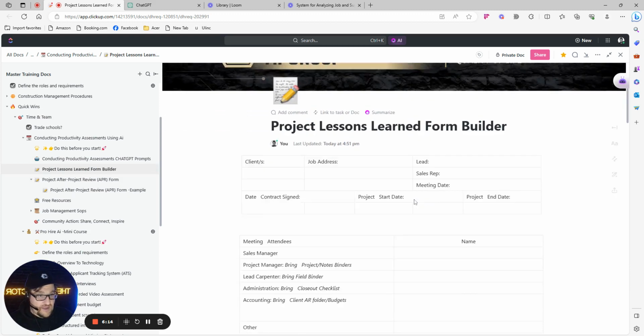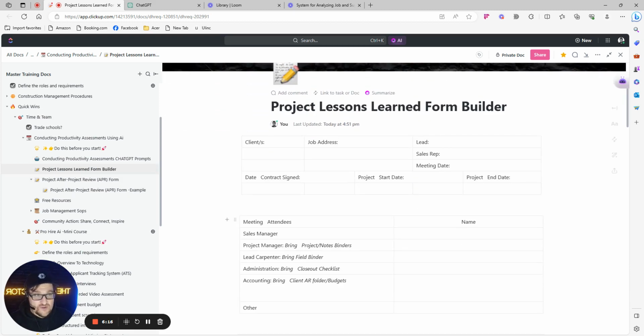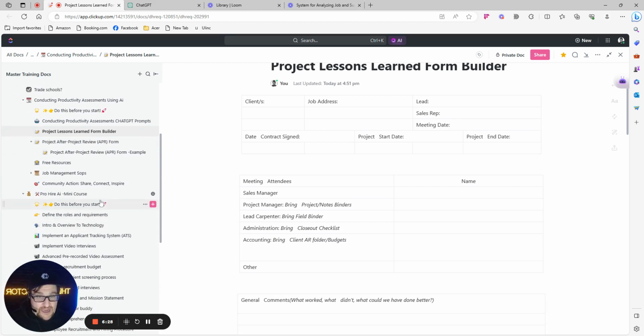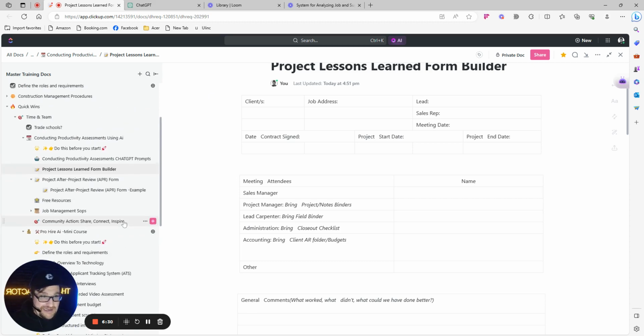Now, what I've done is basically built out ones that are for builders. So if you're a builder or contractor that's doing renovations, this is going to be essentially how we're going to set this up. So first things first, we should be looking at always planning our project ahead. We want to go through a full thorough check. The reason we want to do this is, number one, most problems that occur in the field, or in production, are a result of the sales to production handoff. Okay, and I'm sure we can all relate to that.